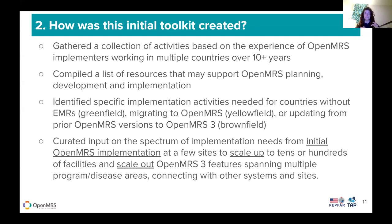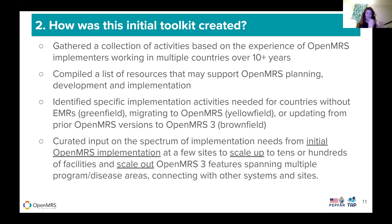We call those 'green field' — you can picture a big green field where there are no electronic health records, where you're going to go and implement one. You might be migrating to OpenMRS, which we called 'yellow field' — switching from one electronic health record to another. Or perhaps you're updating from a prior version of OpenMRS to OpenMRS 3, which we call a 'brown field' implementation. We use these color codes to help distinguish which activities might be more important for someone just starting with an EMR versus those that are more seasoned and transitioning.